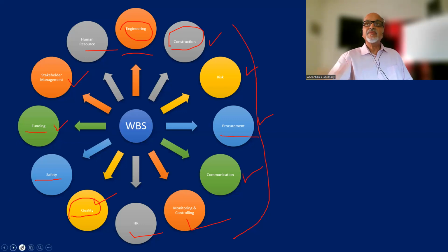We cannot afford to miss out something here, because the moment something is missed out in the WBS, that is not going to be there in the final schedule, and we may miss out a lot of vital activities. So a lot of care must be taken for the proper coverage of the WBS. We should ensure that all the required activities are factored into the WBS. Thus, we arrive at a WBS from the product breakdown structure.